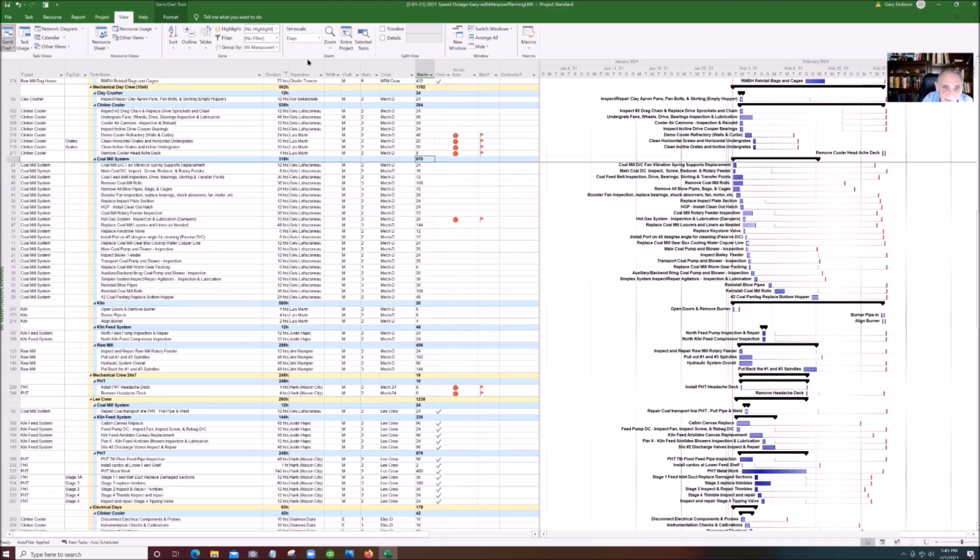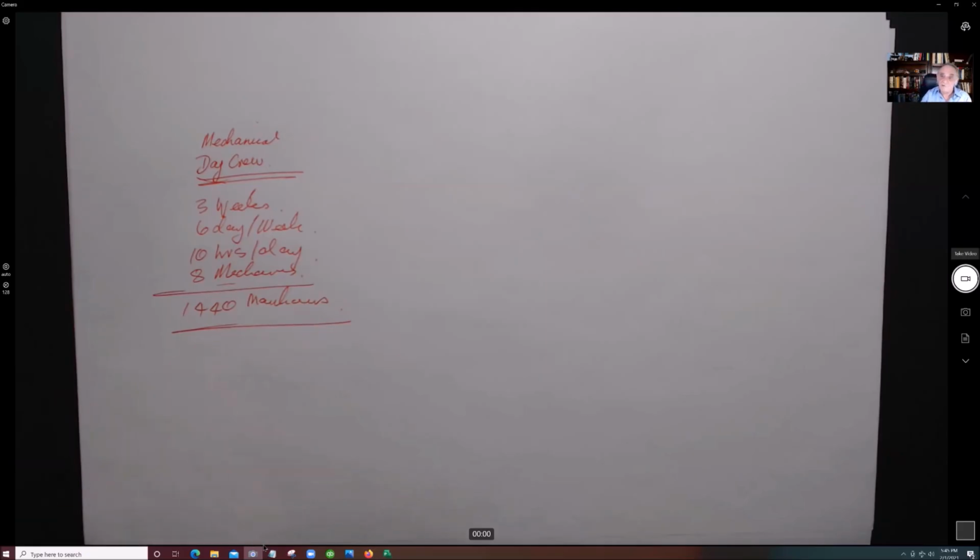It's all given us the complete breakdown here. But the problem is that no matter what we do by way of moving this work around in time over here, we're never going to get it done in 3 weeks because there's 1,782 man hours of work, and we have a total, very simply from our calculation here, of only 1,440.